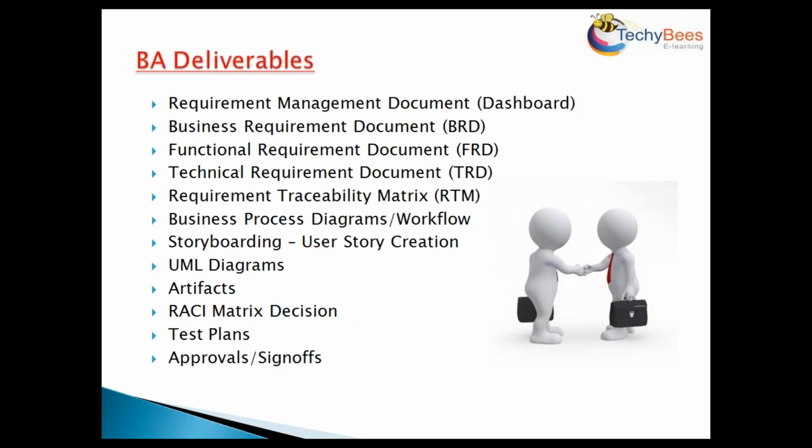So next is the storyboarding or the user story creation. When you listen to a particular requirement from your end user, a scenario, you would create a user story, and then you will also have to create the acceptance criteria for your user story. Not all requirements that you get from your stakeholder will get converted into a user story. Only if there is an acceptance criteria will it get converted into a user story.